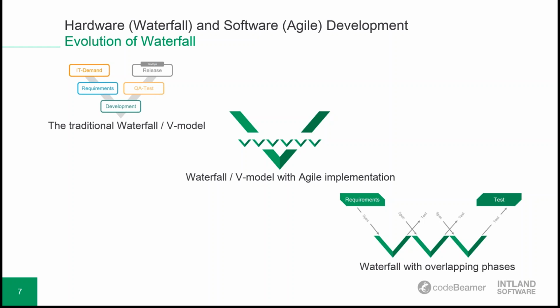I will go back to this, what it means, making some changes. The waterfall with overlapping phases is a variation of the classic waterfall, and it suggests a fair amount of overlap between the phases of the software development lifecycle. The approach is considered suitable for projects that require a fair number of insights between each layer of development as the development lifecycle progresses.